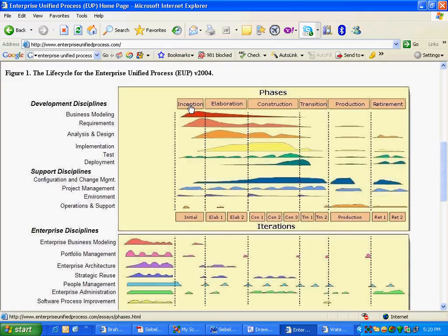There are some formal methods, like change request management. For example, if the elaboration phase results are changed, like requirements are changing, then we have this change request mechanism. It has to get approved by different people, usually the project manager, some lead BA, and some stakeholders also, because it affects the cost. And then it goes back to only that thing, not the entire thing.